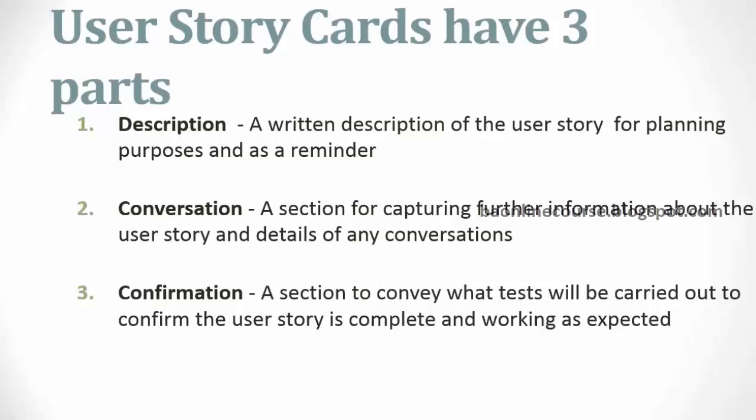The conversation talks about how your screen should look, or what the process flow is, right? So it basically captures all the details about the requirement. It could be a flow chart, or a wireframe, or a series of steps. So the conversation is similar to your basic and alternate flows, everything combined. Right? So you just have that small place to capture all those details.